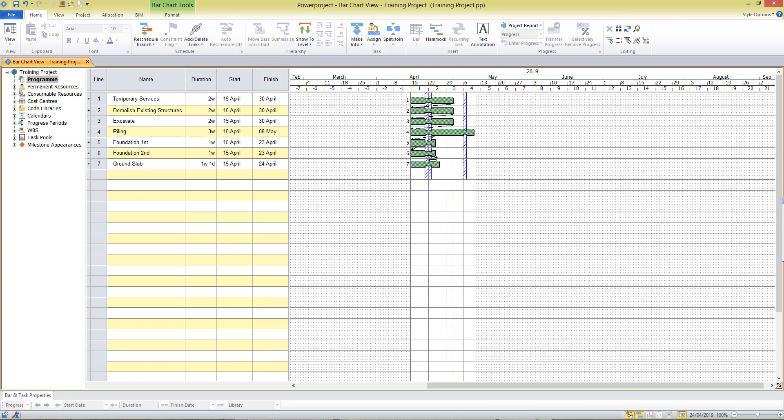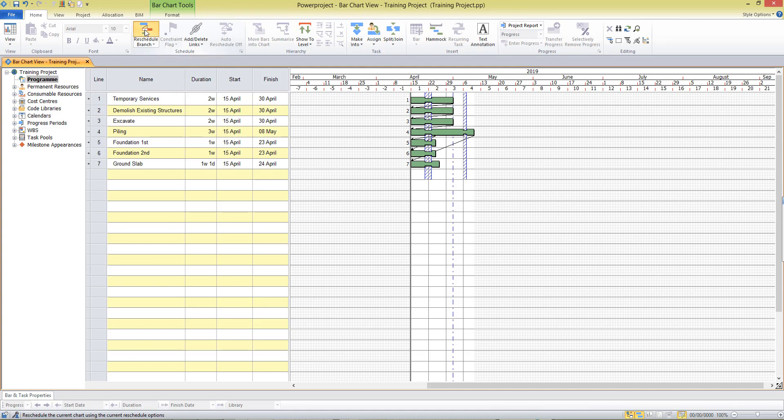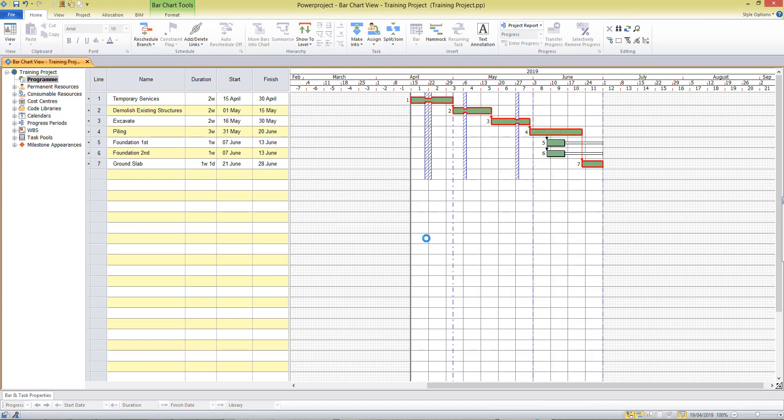And then I'll put a link in there from piling to our ground slab. And when my links are all entered I can press the reschedule button and that will give us a critical path running through our project, calculate the dates for us and it's also shown me a couple of tasks with float here.